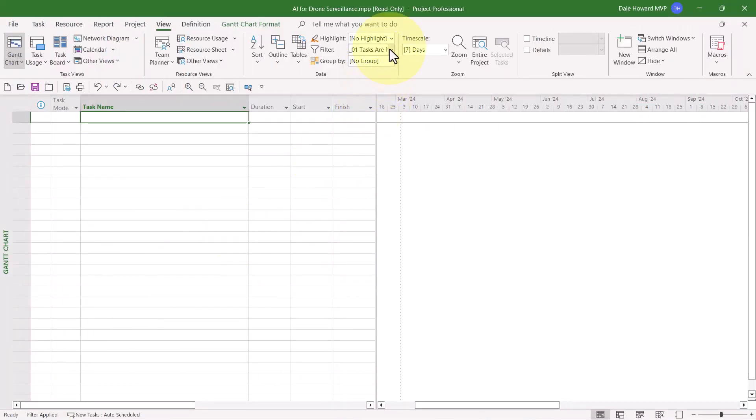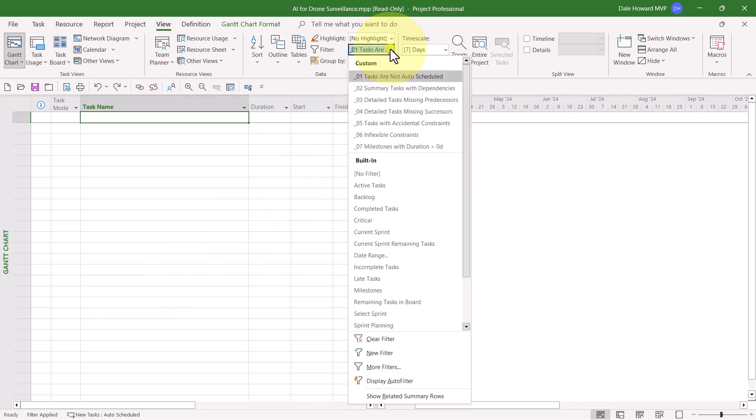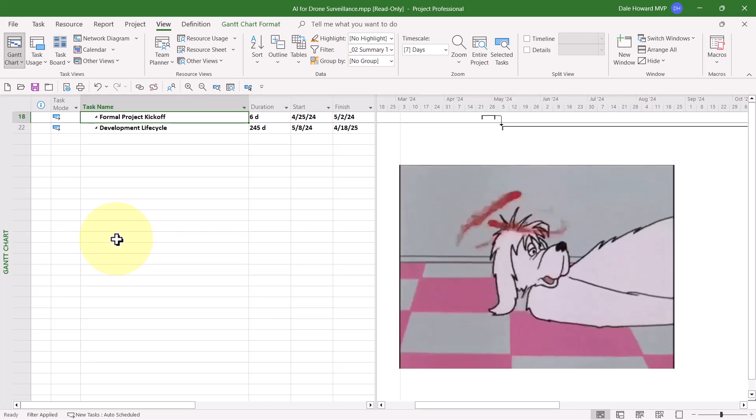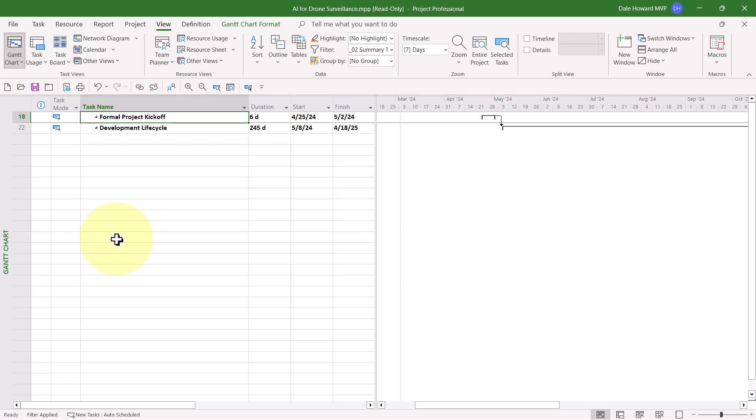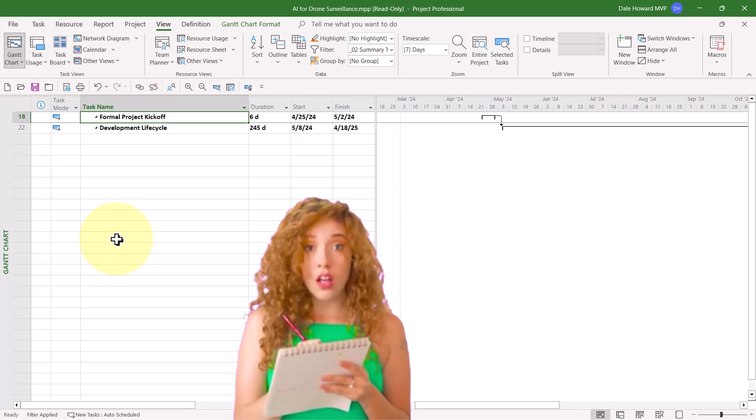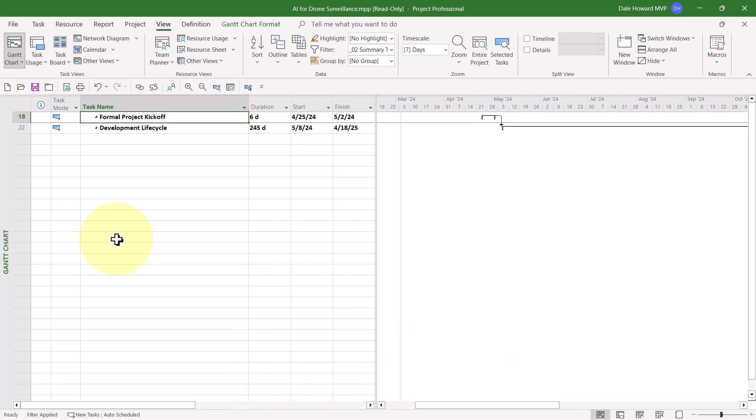So now let's go ahead and look at the second QA filter, which is Summary Tasks with Dependencies. I recommend that you never, ever set task dependencies on summary tasks because that can create circular reference errors in your Microsoft Project schedule. A problem best avoided. So since I have two summary tasks that seem to be linked, if you see linked summary tasks like I do, then here's what I recommend you do.